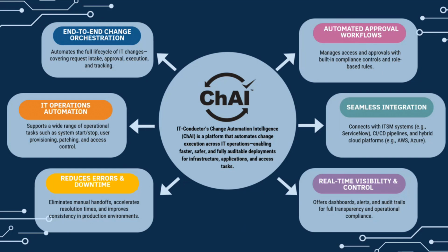And a change could include multiple things. For instance, an example, and we'll do this demo later, you could be transporting some code, and then maybe a fix for something that requires a kernel to be updated, whether OS kernel, SAP kernel, or whatever, Oracle or HANA patching, and then you need a reboot or restart to activate that configuration change. So you've got coding, you've got operational tasks like restart, and you have a kernel, which is like a configuration type update on systems. All these changes combined into one could also increase your downtime outage window, right? A dependency.